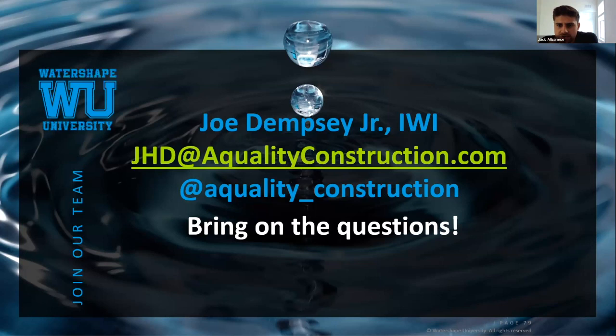So somebody asked again, was this fixed price or cost plus? But Joe, you answered that. I think this was a fixed price job with some change orders, right? Yeah, fixed price with a lot of change orders. And it's like you said, Rick, and I think you probably remember, I go through every plan, look at every word on every page, on every detail, and make sure I completely understand it. I actually redraw everyone's plans to help me go through the building process. So before we had a signed contract, I had a very solid understanding of what it was going to take for us to build it. That's critical for sure, right?